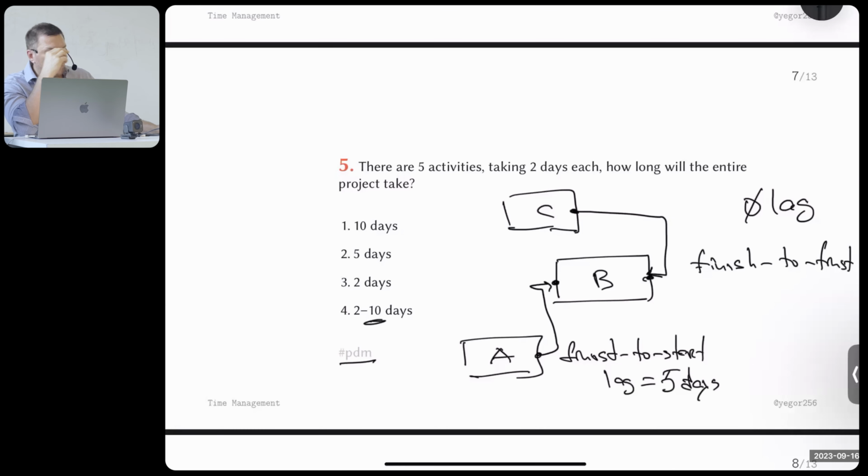So this is the mechanism which you can learn yourself how to do. It's quite a simple mathematical mechanism. You put all the activities together, you make the connections between them, then you calculate the full picture of how long it will take and what goes after what. And then you build it. So this is your job as a project manager.